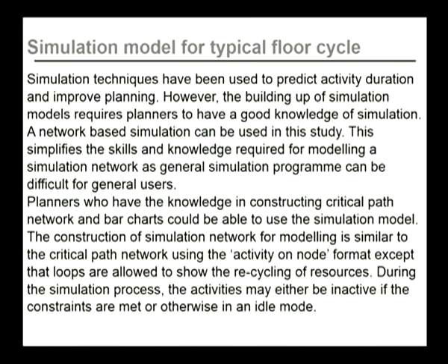The planners who have the knowledge in constructing critical path networks and bar charts could be able to achieve this simple simulation model. The construction of a simulation network for modeling is similar to the critical path network using the activity or node format, except the loops are allowed to show the recycling of resources.